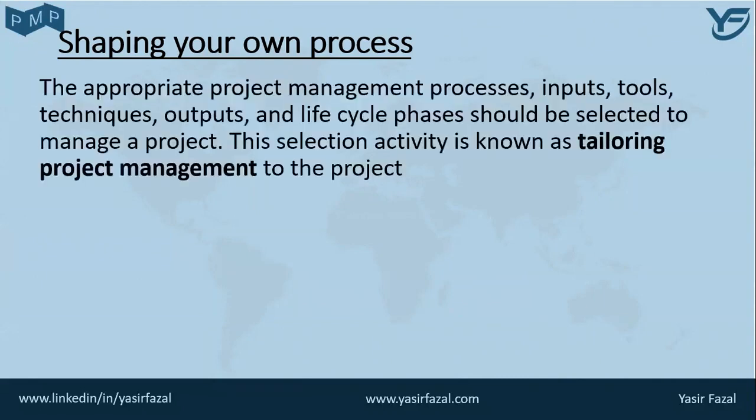I must say that the appropriate project management processes, inputs, tools, techniques, outputs, and life cycle phases should be selected to manage a project. This selection activity is known as tailoring project management to the project. But project managers should collaborate with the project team, sponsor, organizational management, or some combination thereof in the tailoring. In some cases, the organization may require specific project management methodologies to be used.